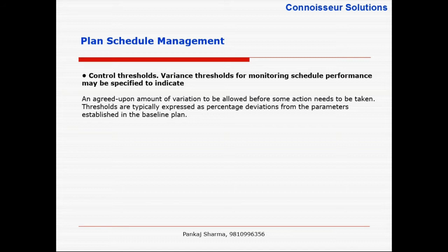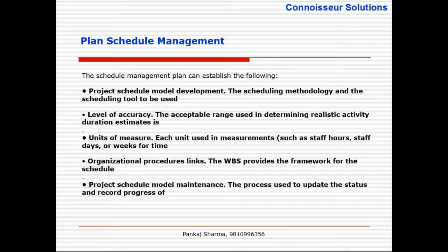above project management. Because sometimes when a project might slip beyond a certain time limit, the whole purpose will become useless. It happens especially when you are launching a new product. When you're launching a new product, sometimes your competitor might also be launching at more or less the same time. So if you cross a particular threshold, the whole effort will become futile. So, the moment you forecast that it might go beyond that threshold, always escalate to senior management to ask for their suggestion. Right? Does it make sense or not?